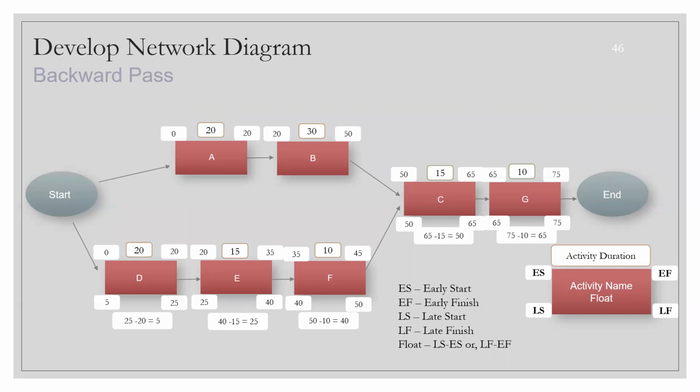And these are the things which you should keep when you are dealing with your external dependencies. Let's say customs or some kind of federal approvals you're waiting on. For those kinds of things you should always keep a minimum amount of buffer, not a big one like gold plating or padding, because gold plating or padding is strictly not recommended for PMP.